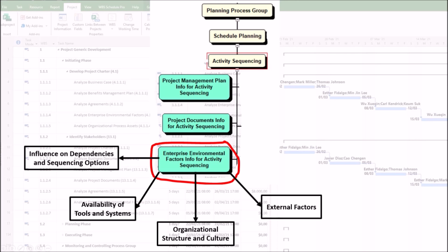4. External factors. Market conditions, supply chain delays, or legal constraints may force rescheduling. For example, a supplier's delivery deadline may require a successor activity to be postponed. 5. Historical data and lessons learned. Records from previous projects help identify optimal scheduling patterns and avoid past mistakes.